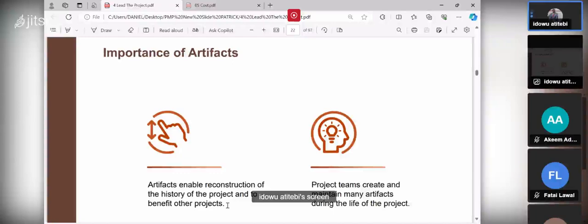So that's why all the information and data about your previous project, your cost analysis, your time schedule, some data, information, records, documents, when you finish your project, don't throw them away. You need to store them in your database so that if you are doing a similar project, go back to that place and search your database and see what information can help you do the present project.